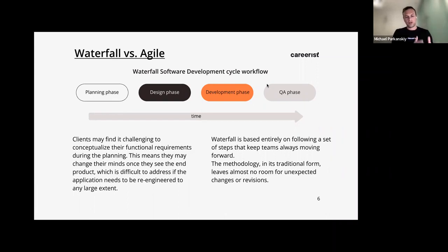In a waterfall approach, you okay everything. You got the requirements approved. You give it to design. The design starts building it. Everything's good. Development, everything's fine. It gets to the QA phase. You start testing it, and you figure out that, you know what, you need more than one server. You need like 3 servers to be able to process 1 million transactions a month. But you can't go back. You could go back and say, look, we actually miscalculated. We didn't know, but we need more servers.